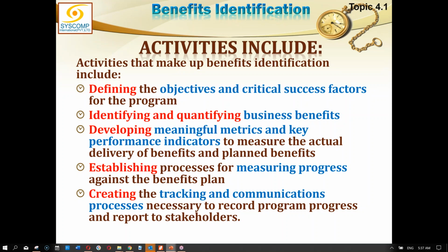This is done at the stage of identification, and it is not necessary that all the information which could be shown in this register is available at the time of identification. We may just jot down the benefits here, and later we learn about other attributes which we keep adding in front of that benefit in that worksheet. So this can be a progressive action, but as much detail as possible at the time of benefit identification must be recorded in the benefit register.